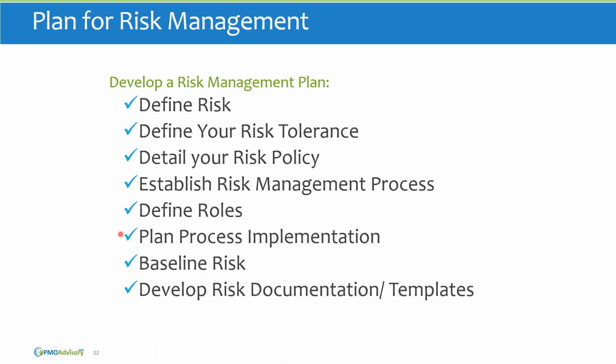And you also want to baseline risk. So if there's particular high-level risks for the project, you may want to baseline those here. And you want to develop risk documentation and templates. So for example, the template risk register that you're going to use for your project can be developed and documented here. However, you don't want to actually store your risks in the risk management plan.